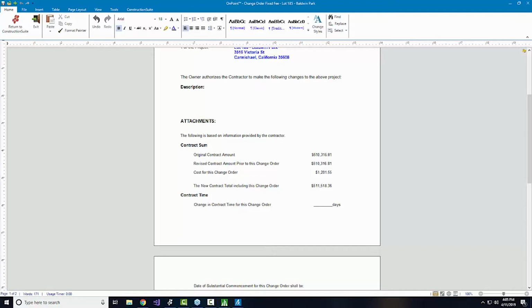So your best practice is going to be maybe decide as a company that you need to have a minimum markup that you would apply to change orders. That's normally going to be more than what you would apply to that original contract. And that's, again, taking a step out of the UDA platform here as well.